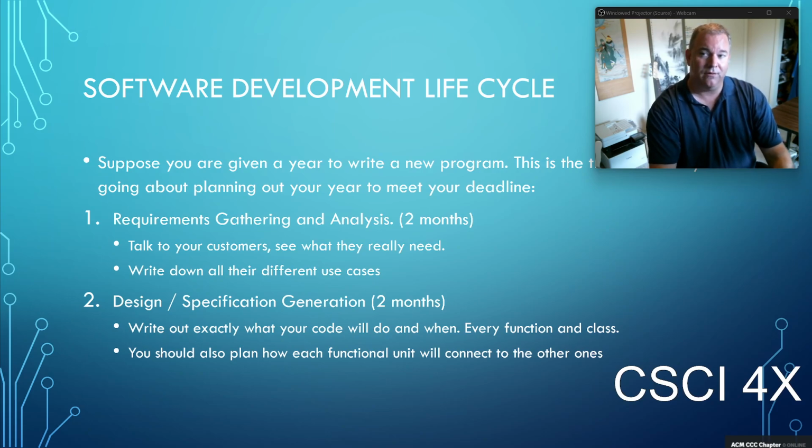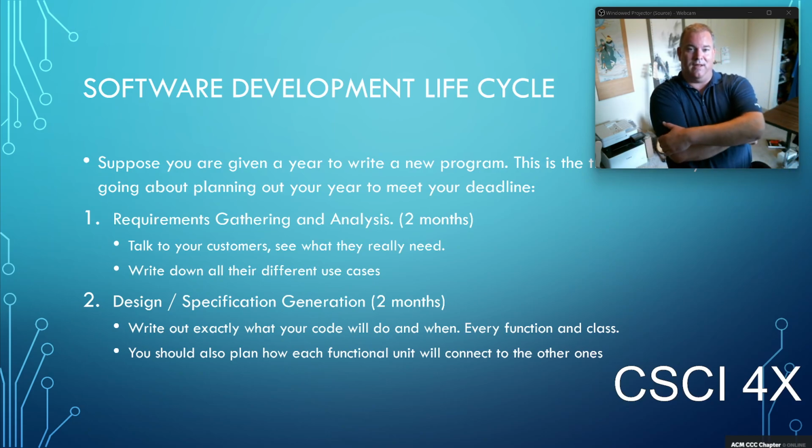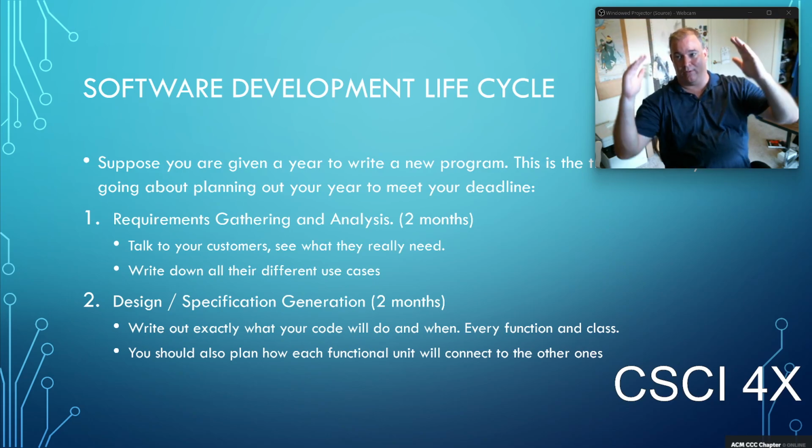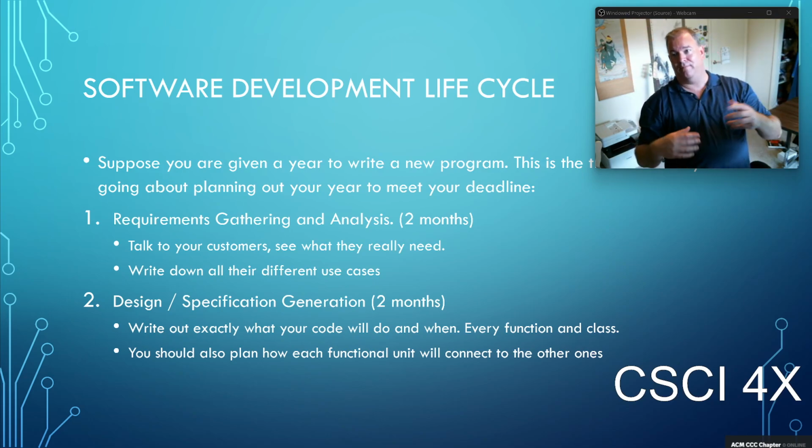And so the way that you're supposed to do it, using the SDLC or whatever it's called, software development lifecycle, the traditional waterfall method, it's called. You spend 2 months driving around to all the different hospitals in the area, talking to all the people that clock in, clock out, talking to the HR people, talking to the managers, trying to figure out all the different features you need. I need a manager override. And then the supervisors will say, we need a supervisor override over the managers in case they vanish, and then we can put more managers in, or hire and fire managers.